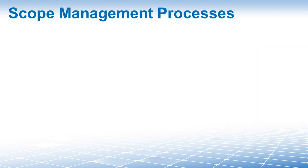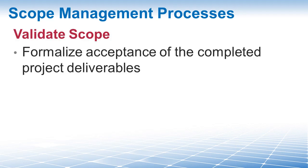Moving on to the last two processes in project scope management — both about monitoring and controlling. The first: Validate Scope. This is the process of formalizing acceptance of the completed project deliverables. You review the deliverables with the client to be sure they are satisfied and will formally accept them. You will inspect the deliverables before presenting them by measuring, examining, and validating that they meet all requirements — also referred to as reviews, product reviews, audits, or walkthroughs. Once the client formally signs off, you forward the documents to the close project or phase process. If there are issues of non-acceptance, you will be dealing with change requests for defect repair or alterations.